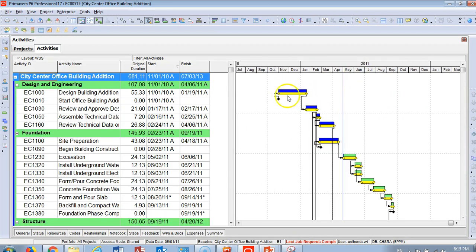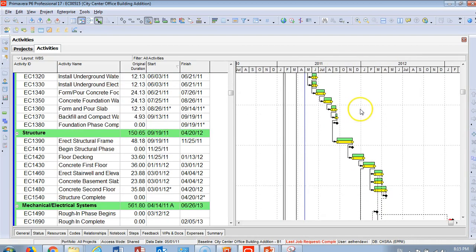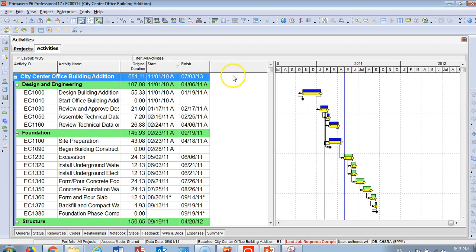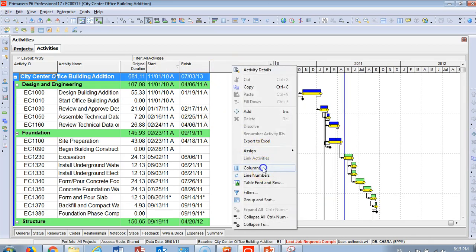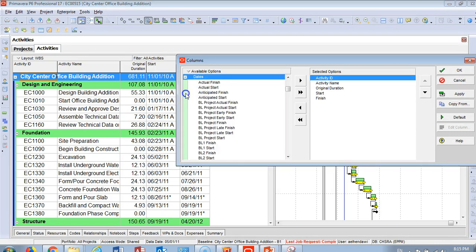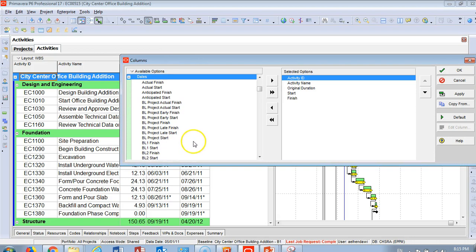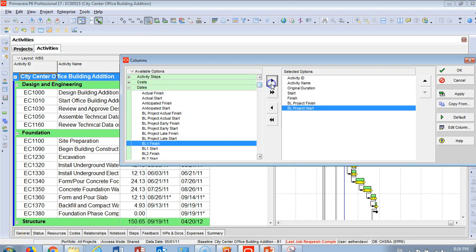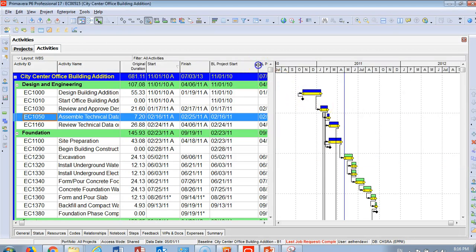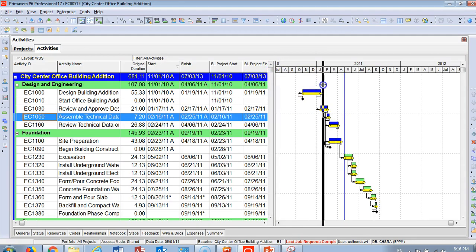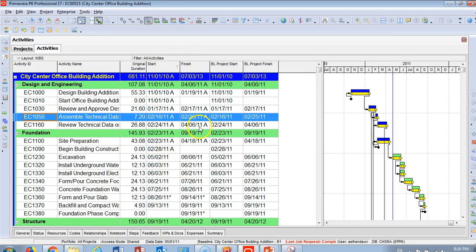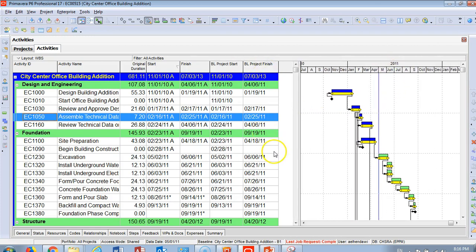The yellow bars are the actual—all the yellow bars are your baseline. You can go here beside Start and Finish and make a column. Look for Dates, and you'll have Project Baseline Start and Finish. Let me add this. I'll make it like this, then OK. You can see now on the screen the baseline start and finish. This is your current schedule, here's the duration, here's the baseline start and finish. Now you can see your baseline and your dates. We're ready for the next step.